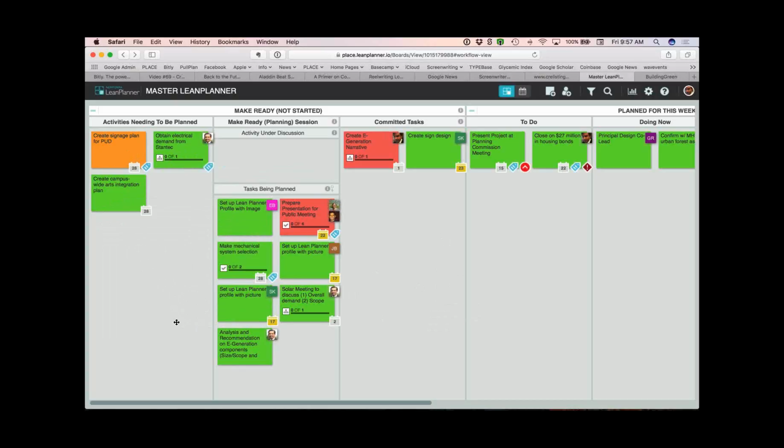Initially, when you have a planning session, you might have a lot of cards, but I think you'll get the most value out of the system when you create the granularity for a couple of weeks or months ahead, where you get all the tasks in, and you don't try to get all the tasks in for the next year. So you manage a two-week or month rolling window ahead with all the granularity, so everybody is working together. But if all the team members are not collaborating and working together, then this becomes difficult to manage also. Oh, absolutely.